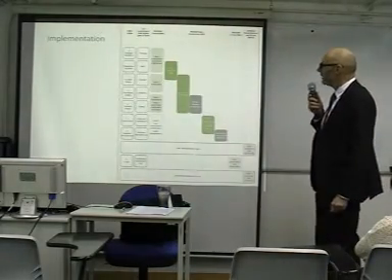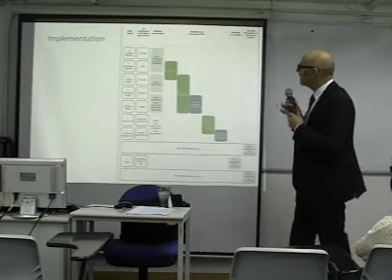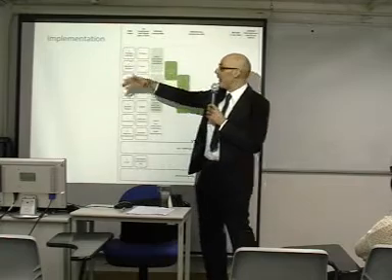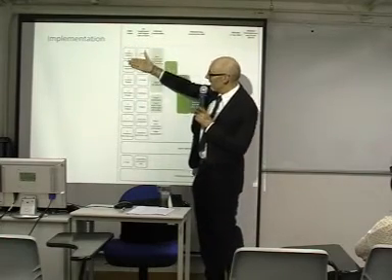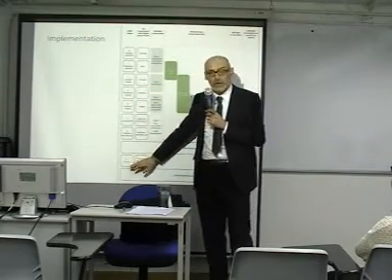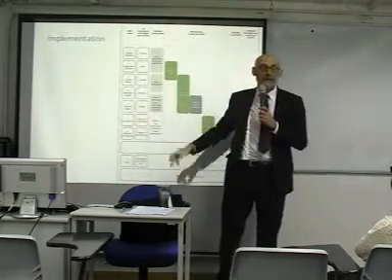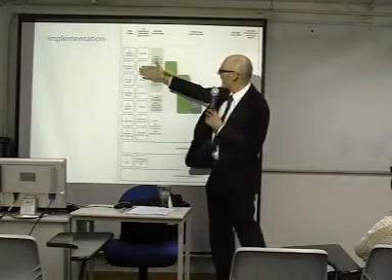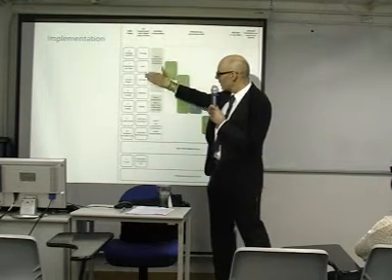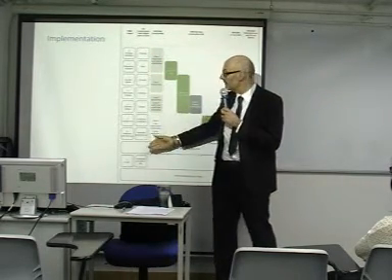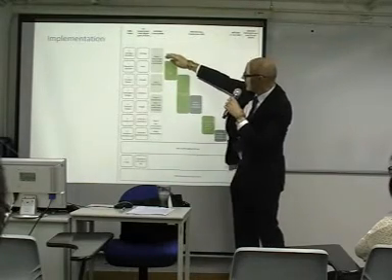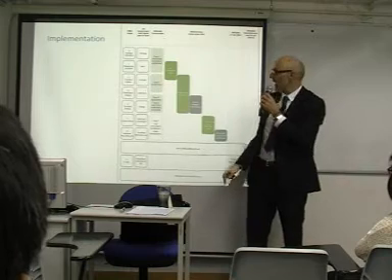In terms of the planning process, there's guidance with the RIBA stages of plan of work. To give an idea about where this is brought in, these are the RIBA stages, stages 0 all the way through to 6 and 7. So this is normally how buildings are designed, developed under the RIBA plan. Alongside is the UK government draft digital plan of work, which is BIM enabled. And you can see that BREEAM communities planning and BREEAM new construction are phased along these elements.